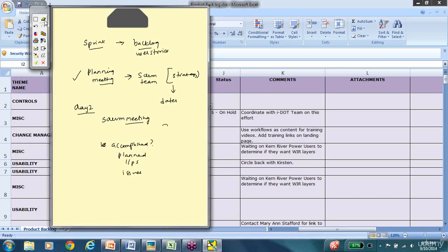Now, the effectiveness of the Agile model completely depends on keeping the team size small. If the team size is, let's say, a 10-member team or a 15-member team, the Scrum meeting is not going to be done in 15 minutes. You will have to actually extend your time. And in the everyday Scrum meeting, the business owner is also involved.